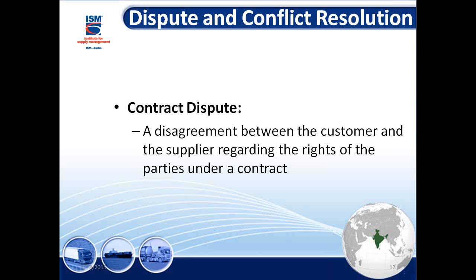So even when you are trying to make your organization liable for something, don't say my organization shall provide this. You have to write will. But if you're writing about the supplier, then you have to say shall. So you have to understand the English word. I know in Hindi we don't have equivalent words. In English, each word has a meaning. So legally it conveys a different message.